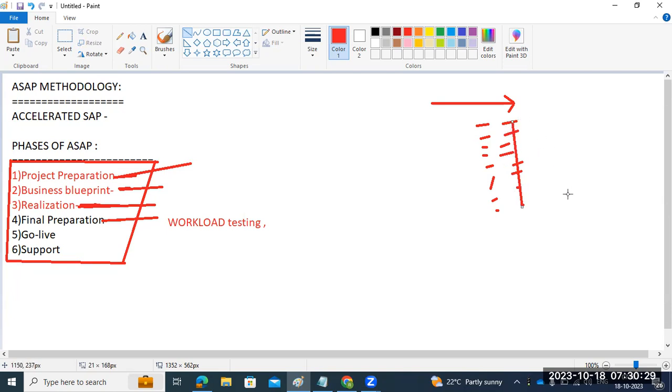They will work internally with their project managers and everything. When we will complete all those things, we will say roughly 2 months. For 2 months, this many hours, this many dollars it will require, this many employees are required. Like that they will cost it and send the proposal to the customer. The customer team will review all the proposals and finalize one company, saying this company has quoted very little or has quality work, and they will give the final project to this company.